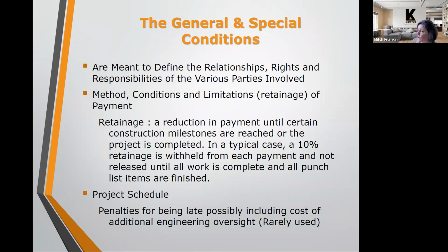And then if there are any items that need to be addressed before that final retainage is released, that percentage is held on to. It's oftentimes 8% or 10%. And then once all the punch list items are satisfied after the project is completed, that retainage is released.